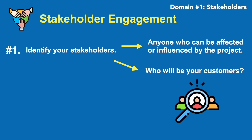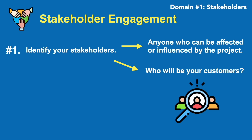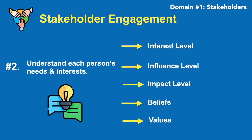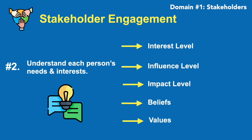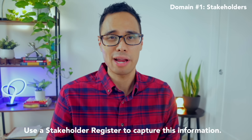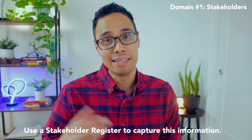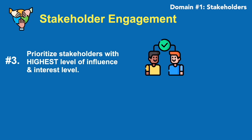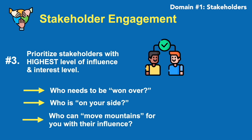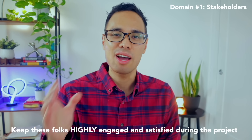Step one: identify your stakeholders — anyone who can be affected or influenced by your project's objectives, including your team and the customers who will use your end product. Step two: understand what their needs and interests are. Analyze each stakeholder by considering their interest level, influence level, impact, values, and beliefs. Document this in a stakeholder register and keep it confidential — for your eyes only. Next, prioritize stakeholders who have the highest level of influence and interest. Is there anyone who is not supportive of your project that you might need to win over? It's your goal to keep these folks highly engaged and satisfied.